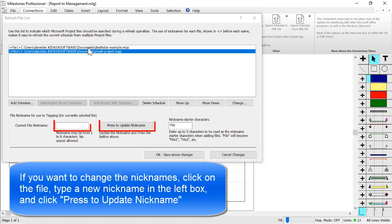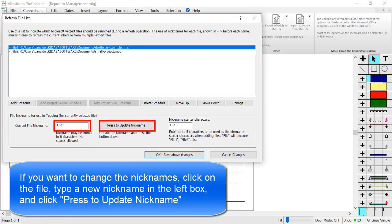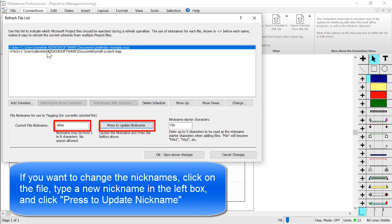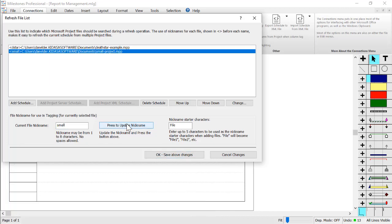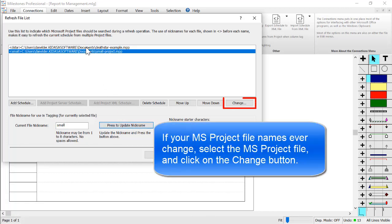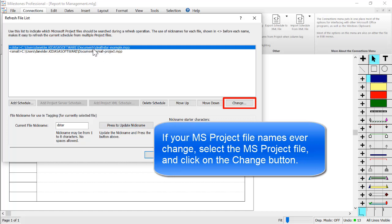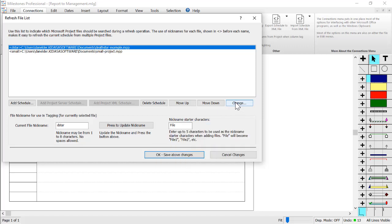You can use the default nicknames, but it might be a good idea to change the nicknames to something more descriptive, up to eight characters. For the Death Star file I will change it to D star, so you can type your new name in the left box down here and press Press to Update Nickname. Then I'll choose the small project and I will give it a nickname of small. If your file names ever change later, you can select the file and then click on the Change button and choose that new MPP file name. Once the nicknames are set up, I'll press OK to save all changes.